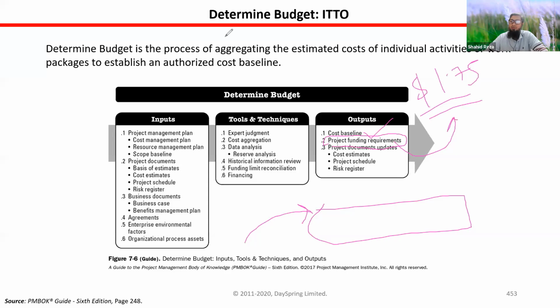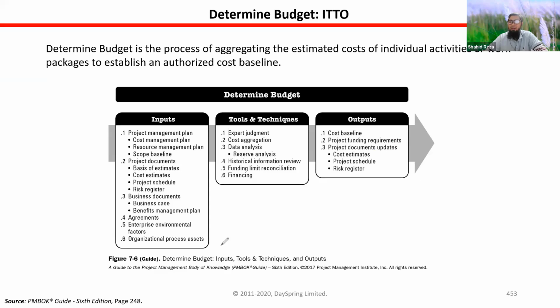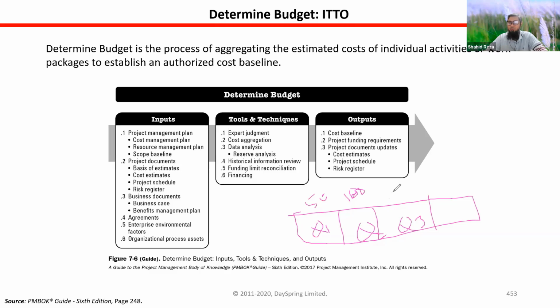Donor funded or private sector, everywhere. So you have to show that in quarter one, quarter two, quarter three, for example, this project will need 3 quarters or 9 months. So when do you need how much money? In quarter one, say you need 500K. In quarter two, maybe you need 1000K. And the rest, 250K, you will need in quarter three.